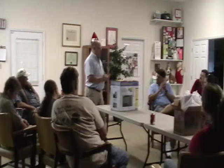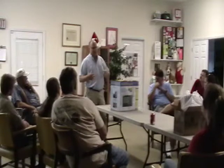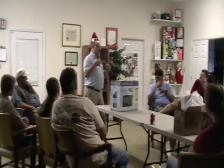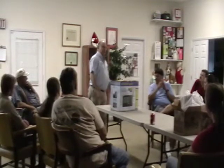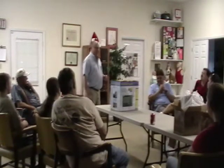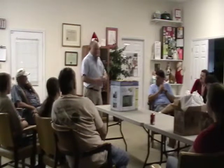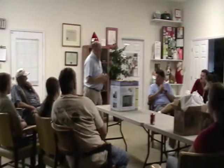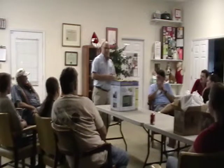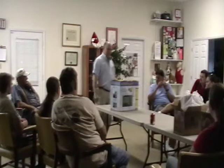So what we did as a general contractor, we investigated weather stations. How can we best defend the case? Let's hope it's not a case. But how can we prove our position? So we said, let's get a weather station. Let's see how that works. It'll document the weather at our job site. If we have problems with cold, with wind, with rain, people will know that.